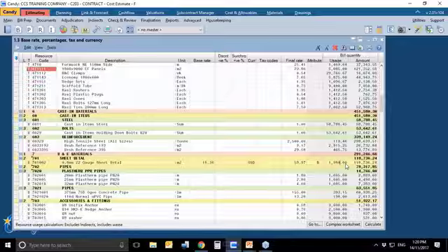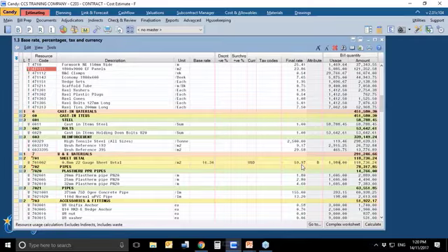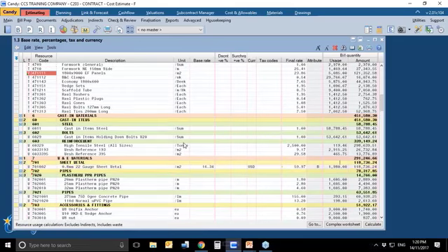On the right hand side, I've got the bill quantity usage, which tells me that on this project, you're allowed to use 1,980 square meters of the sheet metal. And to buy 1,980 square meters of sheet metal at 59.97 dirhams per square meter, you're allowed to spend 118,000 dirhams.